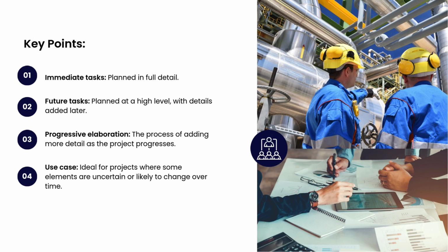Key points are: immediate tasks, planned in full detail. Future tasks, planned at a high level with details added later. Progressive elaboration, the process of adding more detail as the project progresses. Use case, ideal for projects where some elements are uncertain or likely to change over time.